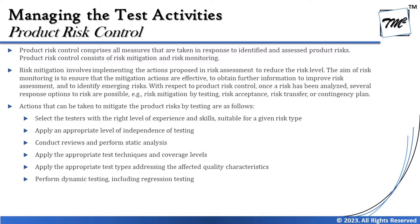As the project unfolds and more details come into picture, as the product is built, you have more information. Therefore risk identification and risk assessment should be a continuous activity — performed at every milestone to check whether new risks have occurred. Initially you may not have all the information needed to identify all possible risk areas, so risk monitoring means consistently identifying new items or recognizing when a previously identified risk is no longer relevant.